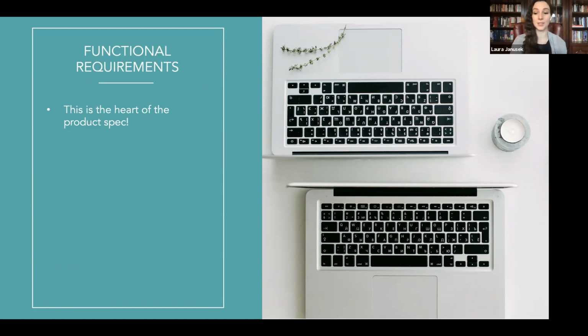But sometimes you might. And so the actual functional part of the document is going to be a small couple of bullet points, and the rest of the document is all about telling the user story, building the business case, all of that. But the actual functional requirements part of the document can be really small. It's just going to cover what's in scope, what we are trying to do, and hopefully it'll also mention what's out of scope, because that's just going to automatically answer people's questions of, but can it also do this?